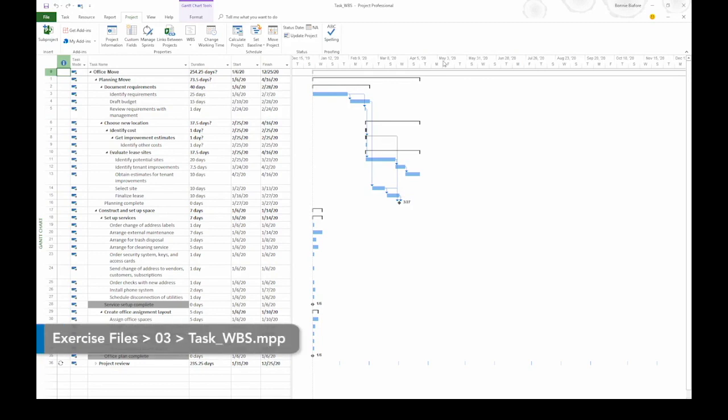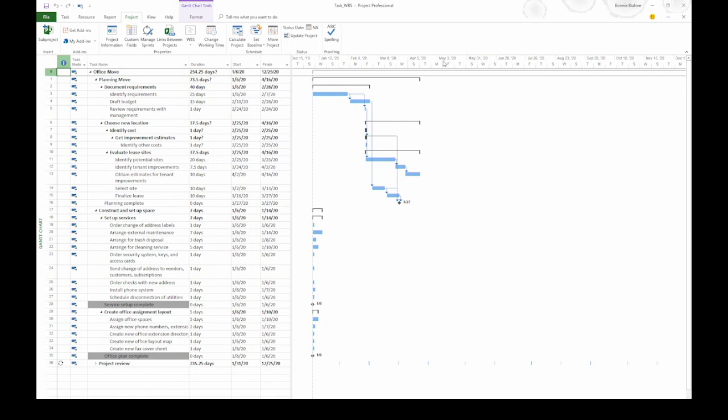You can set up WBS codes in project to uniquely identify each task in your project. First of all, the task ID column over on the left side of the table, that is not a WBS code. Task IDs will change as you rearrange your tasks, so you can't use that for a WBS.